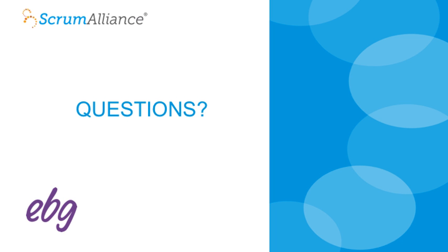The first question I have is, do you have any advice for getting team buy-in on having Ready stories, or having stories at Ready before pulling them into a sprint? On getting team buy-in, well, I guess a couple of things. First, use some data. Look at what the potential ill effects of not having items ready are. So if you're having carryover stories, you're not getting to Done, you're having all kinds of interruptions in the sprint, and in your retrospective, focus on what's happening here where we're not able to get to Done.